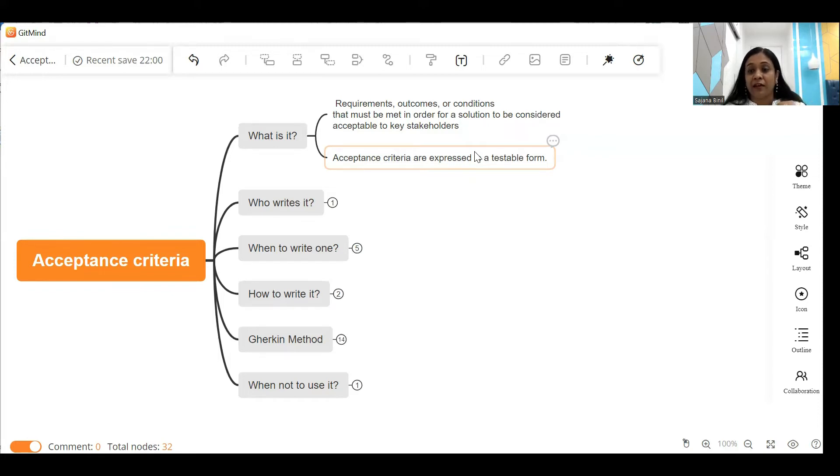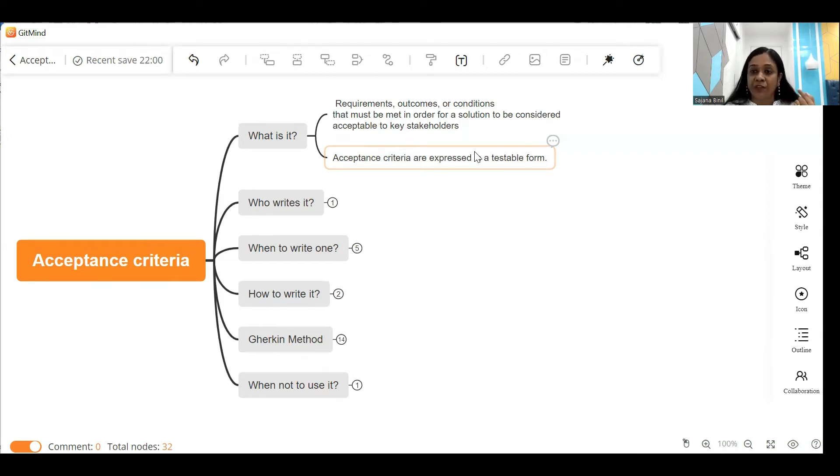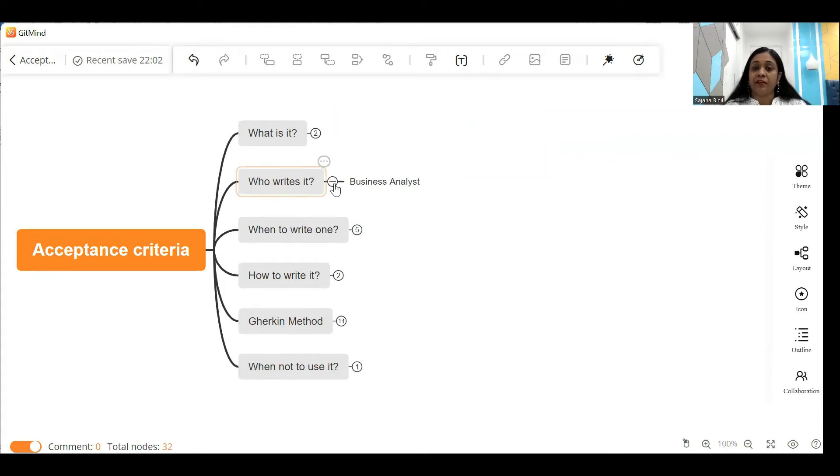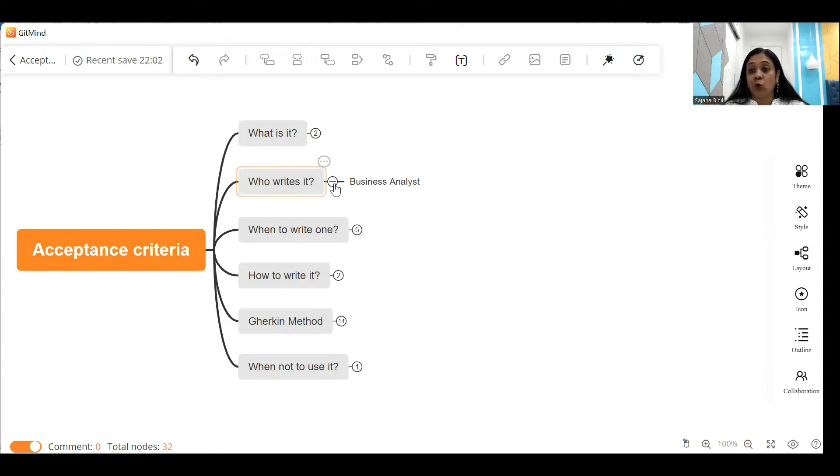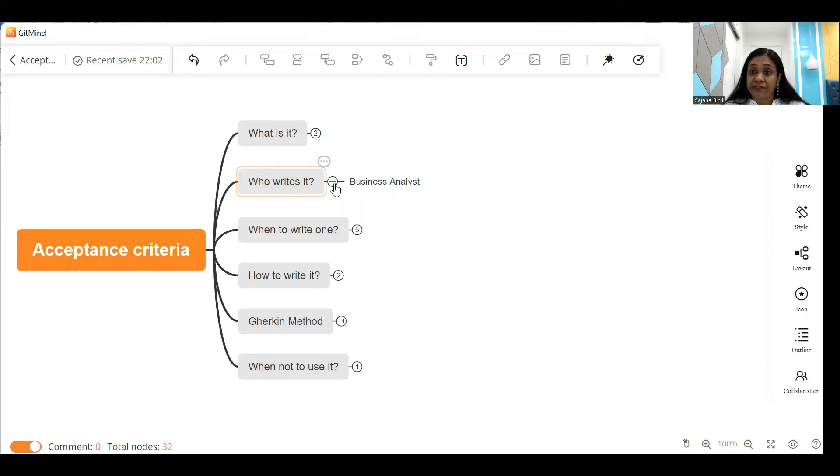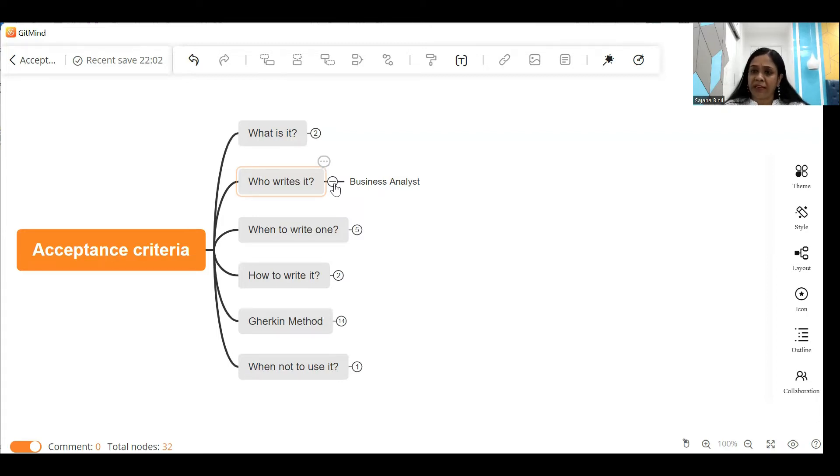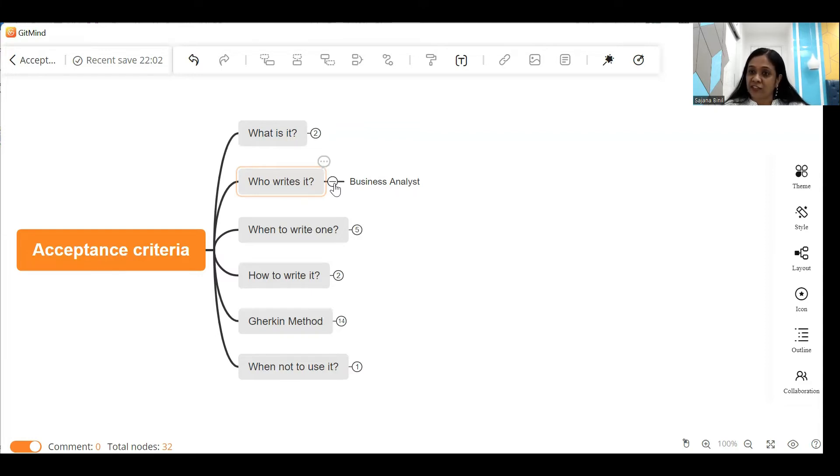So who writes the acceptance criteria? Well, it is jointly written by the business analyst and the product owner. The product owner defines the acceptance criteria and the business analyst formulates it in an appropriate condition and attaches it to the user story.